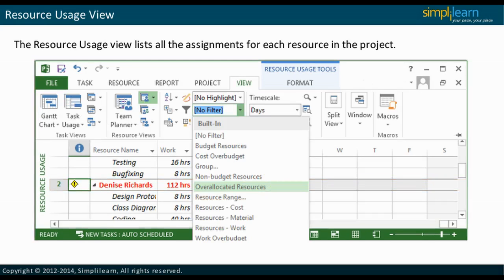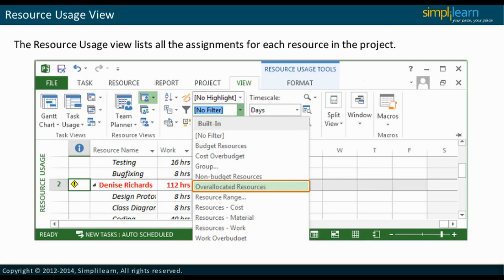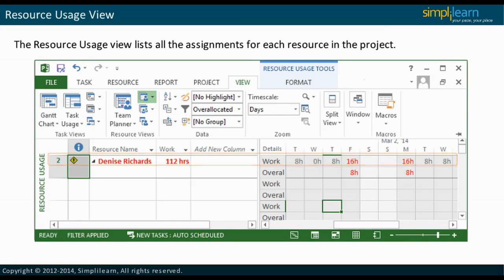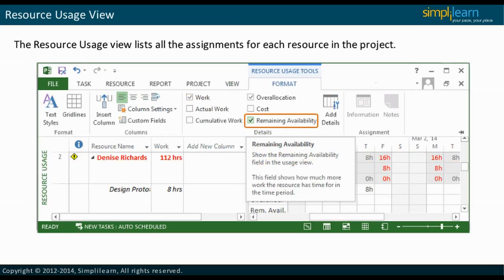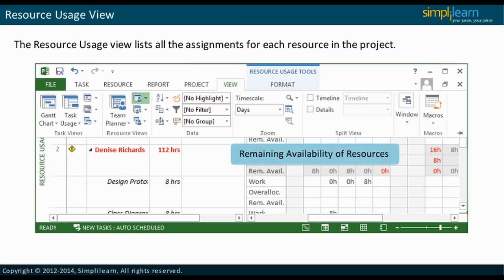If a resource is over-allocated, the project manager can view the hours allocated to the resource for each assignment so that the workload can be balanced. By setting the filter to over-allocated resources through the View ribbon, the project manager can modify the view to display only over-allocated resources. By selecting the Remaining Availability option under the Format ribbon, the project manager can also check the remaining resource availability to balance the workload.